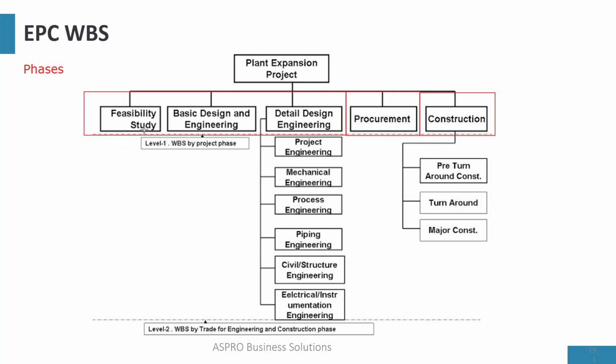Now, if you're using the phases, what happens is that underneath, when you start breaking down, you can now switch to deliverables. So that means that you can start with phases, then underneath each phase, list the deliverables, then keep breaking it up. Or you can just start with deliverables. It's your choice, right? And of course, there are usually templates, so you can pick from there, right?